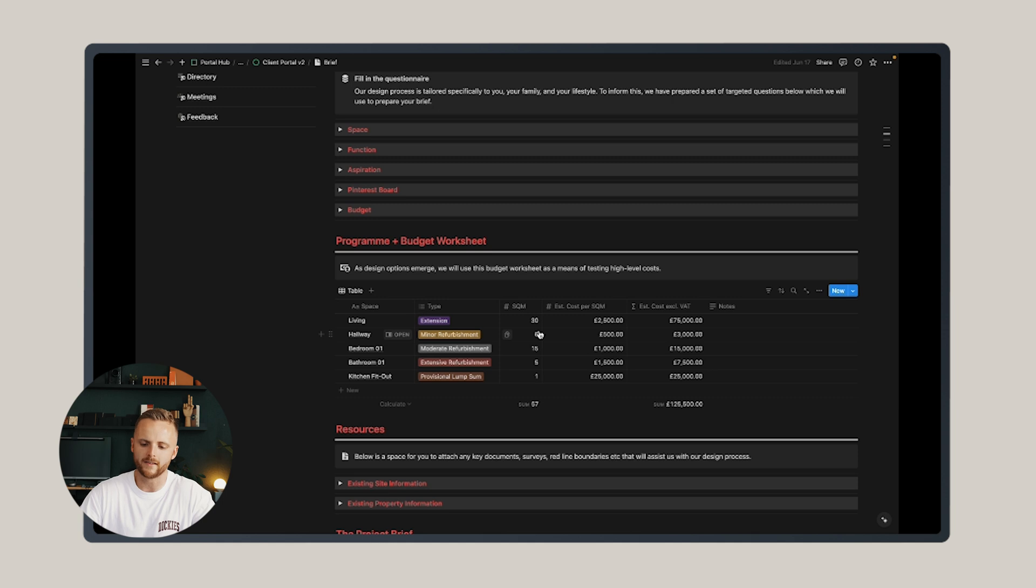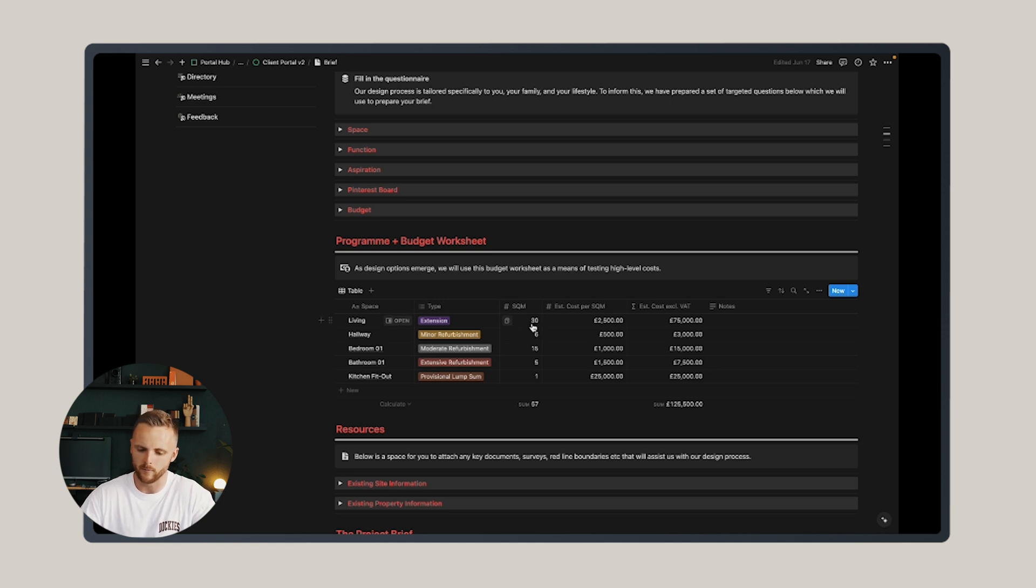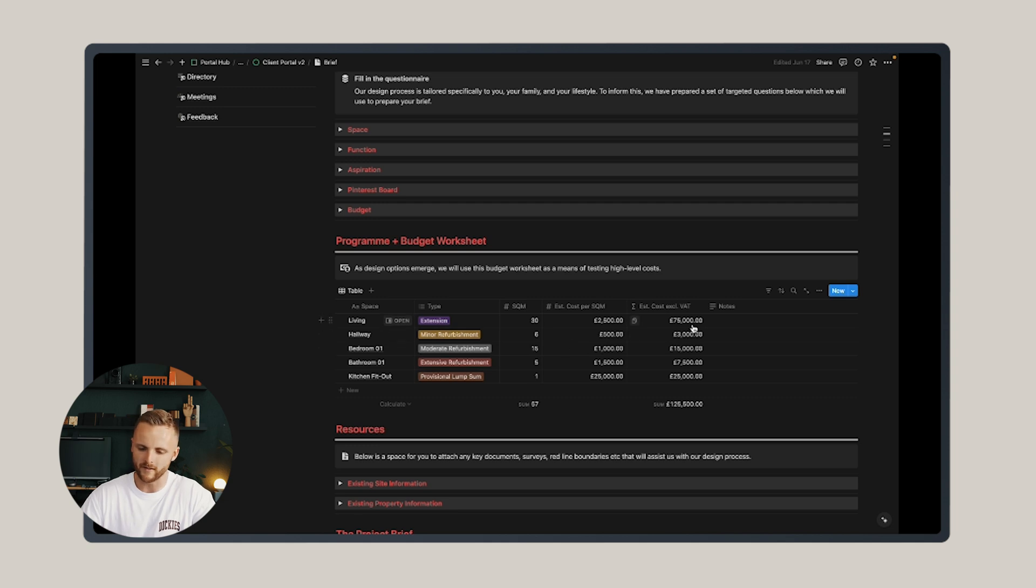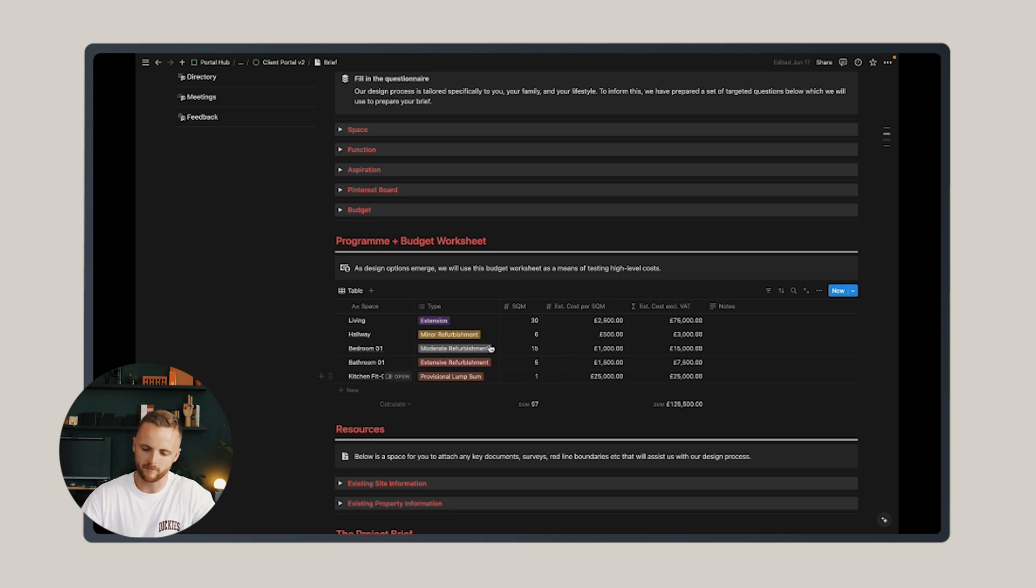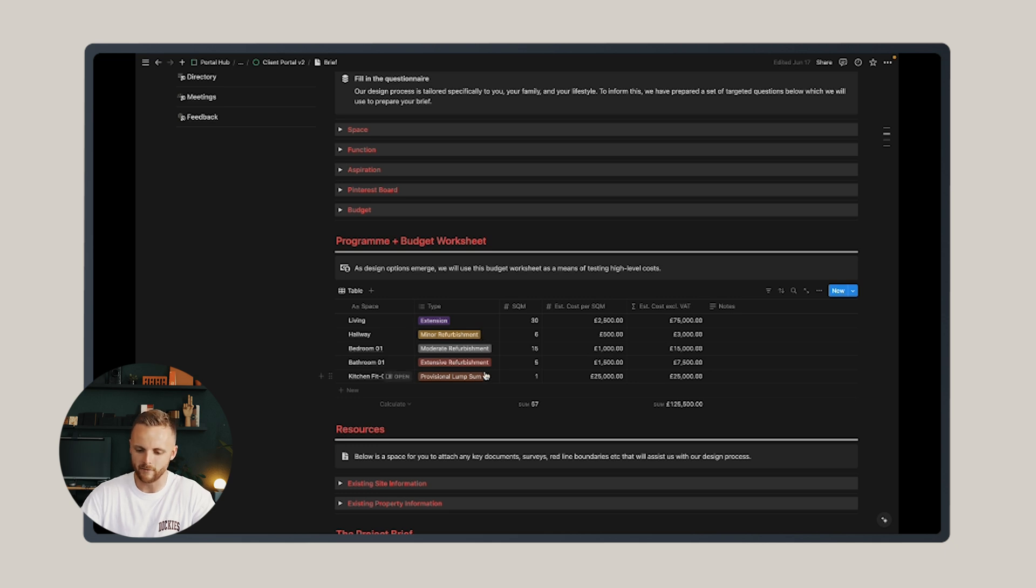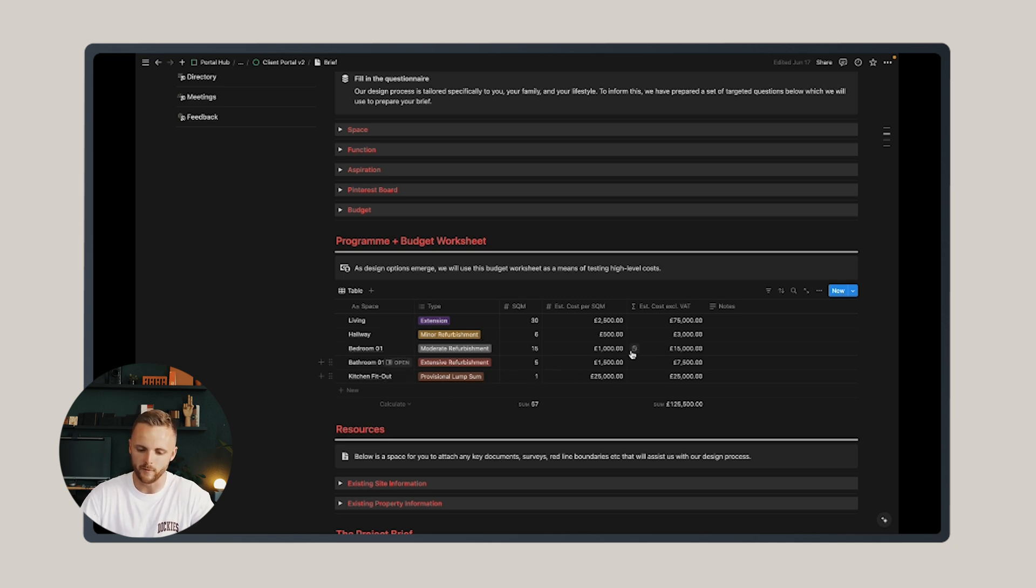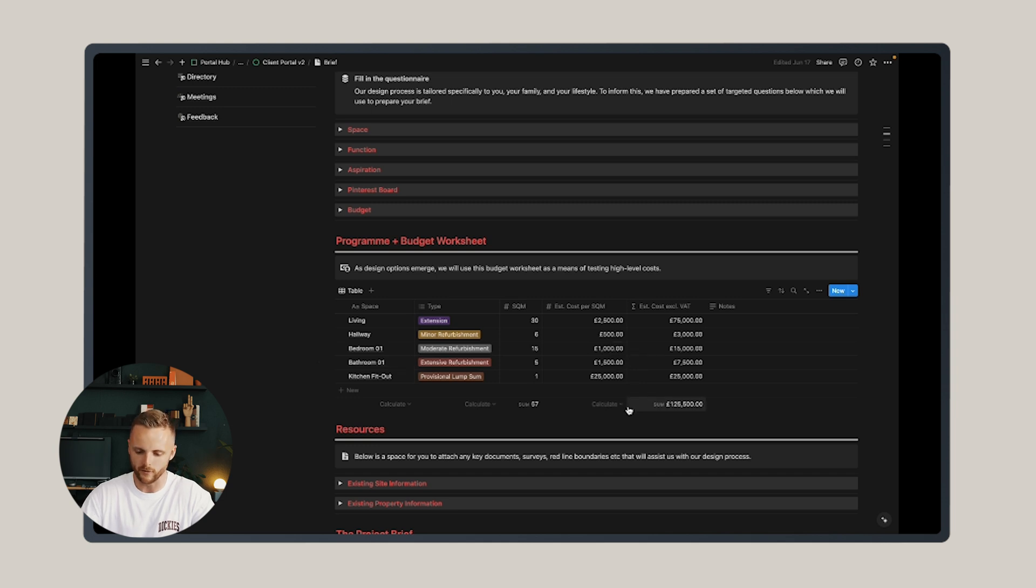Let's say we think that an extension is going to be £2,500 per square meter, and we're looking at a 30 square meter extension. You can input that into this table and it'll come out at £75,000 excluding VAT.